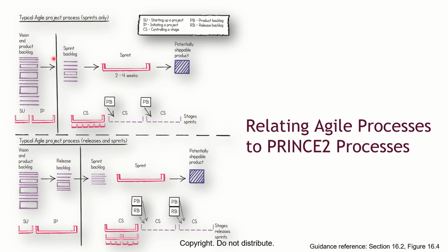So what you see here, which are called sprints, are the breakdown of delivery, the breakdown of different stages of delivery. The delivery stage here is what we call potentially shippable products. That means a product you can make available to customers. Even if that product does not have all the required features, it could still be used.